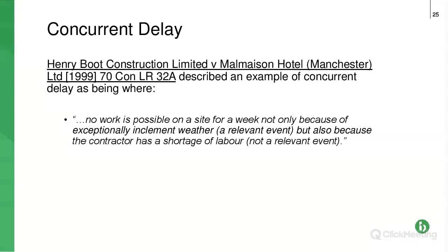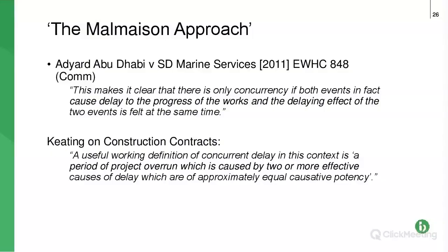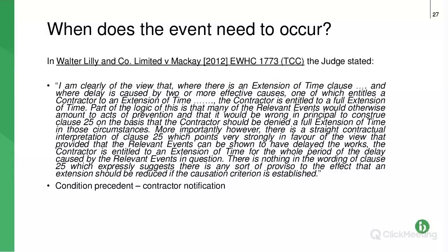But at the same time, there is also a delay caused by the contractor not having had sufficient personnel on the site. Now, effectively, it sort of goes with the contract. So, if you're entitled to an extension of time for the main cause, then you get your extension of time. So, contractors are probably okay, but for